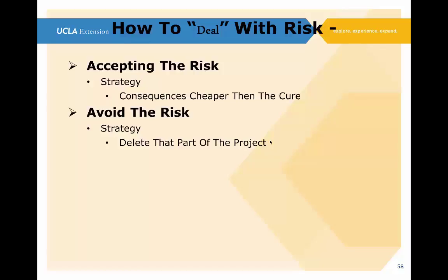And further, we had no knowledge of their system, of the overall larger system that we were integrating into. And in addition, we were not going to take responsibility for something we didn't know anything about or have anything to do with. So we made a decision, and I talked to their project manager. I said, we will work with you on that test. We will be responsible for our system. We'd be interested in seeing what the overall delay or propagation time is, and how long it takes and all that. But we will not be responsible for the response time, including through your system.